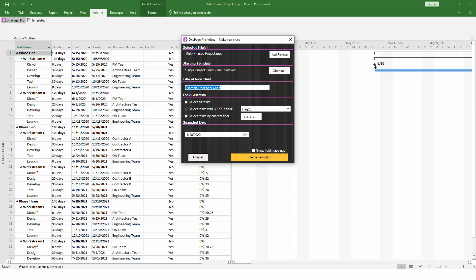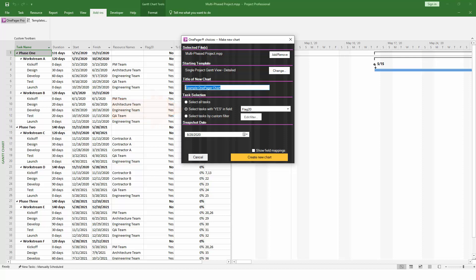As discussed earlier, OnePager gives you the option to decide which tasks and milestones to include in the chart. OnePager filters using flag 20 by default, and since that's what we've already set up in Project, we can leave this setting alone. However, you'll notice that you also have the option to select everything in your project or create a more advanced custom filter. Most users are happy just using the flag field.